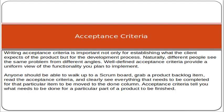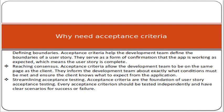Why do we need acceptance criteria? First, to define boundaries: acceptance criteria help the development team define the boundaries of a user story, serving as confirmation that the application is working as expected, which means the user story is completed. Second, reaching consensus: acceptance criteria allow the development team to be on the same page as the client, informing the team exactly what conditions must be met and showing the client what to expect. Third, streamlining acceptance testing: acceptance criteria are the foundation of user story acceptance testing — every acceptance criterion should be tested independently and have clear scenarios for success or failure.